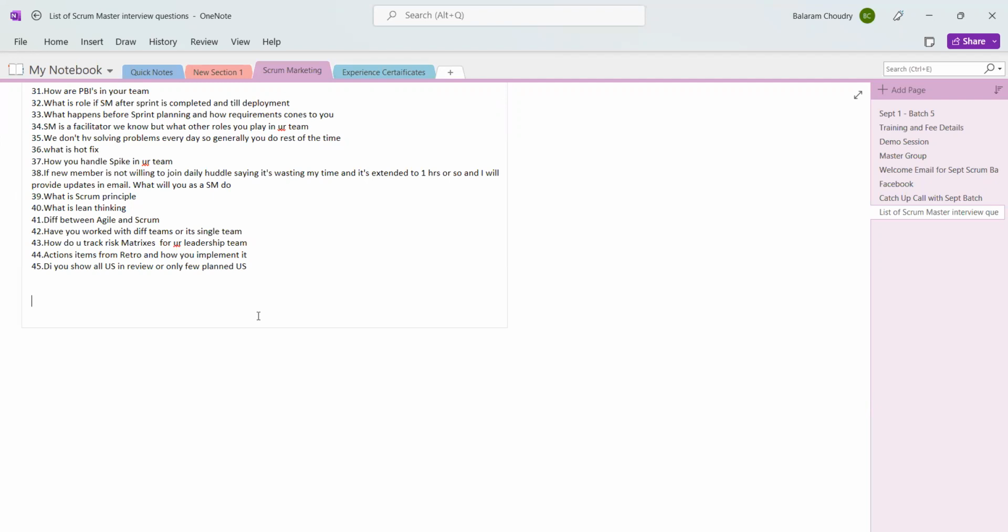See, it could be possible that even you might be committing certain things to another team. A team can depend on your team also. It's not always you are depending on another team. Maybe the other team is dependent on you, right? And what does it mean? What will you do if you commit certain things to another team? You will always prioritize your sprint items over the committed items. Do you all agree? So your committed items can take a back seat sometimes. Therefore, the best process improvement could be having a regular meeting with the team that is committing things.